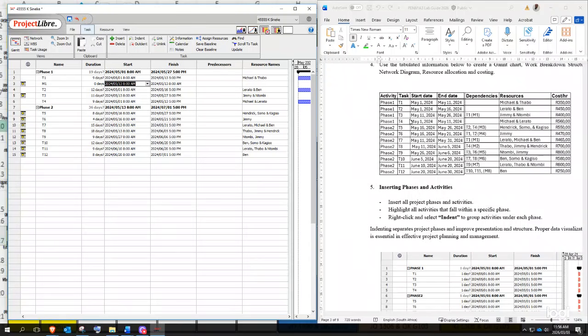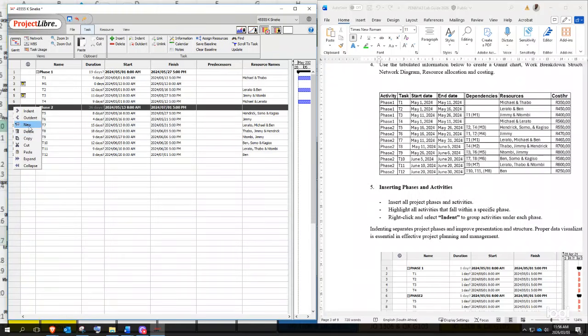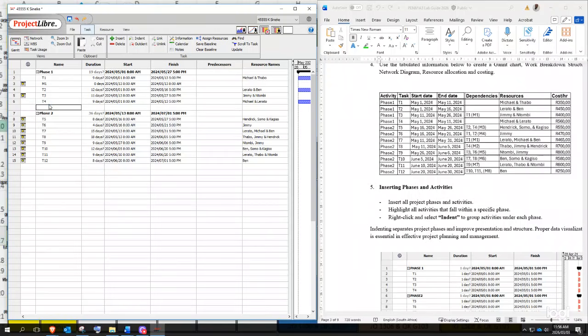So we could say M2 depends on T4 having been completed for it to be reached. So we go to T4, insert our milestone, which is M2. Remember the duration 0. Start is the finish time of T4, which is the 13th.